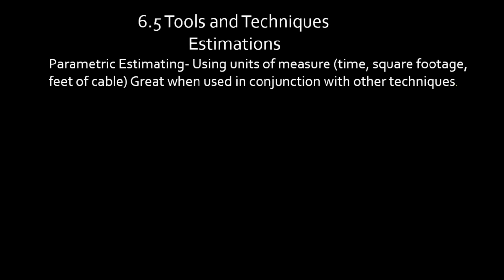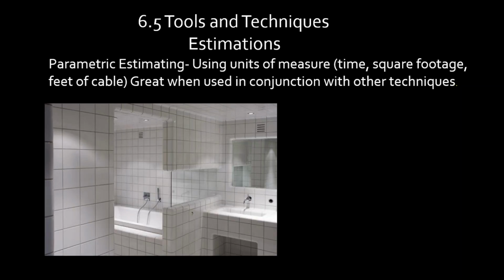Construction, this was real big, okay? Because I can take drawings and do takeoffs off of drawings. I can figure out lengths of cable that I need, how many fixtures in each room, because I can count them right on the drawings. These are units of measure, okay? So, example, this bathroom tile job. How much tile do I need? I could probably come up with a pretty good estimate by just figuring each tile is 4 inches by 4 inches and doing the math, okay? That's what parametric estimating is, using units of measure.